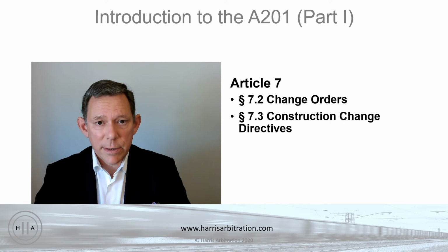And that then gets into question of disputes and claims, which we'll talk about later on, but just understand right now that there's a big difference between a change order and a construction change directive. A change order is where the parties agree on the impact of a change and memorialize that in a modification of the contract. The construction change directive is unilateral from the owner and simply tells the contractor, you will do this work, and we'll worry later about how much extra time and money, if any, you get.